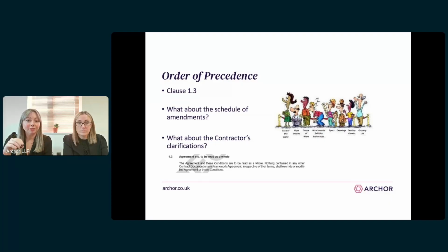So if you're a contractor and you want to rely on a set of clarifications or assumptions, whatever you want to call them, it's really important these are dealt with in the contract and that they're given the correct weighting so they don't rank behind another document which would override what the contractor assumed at tender stage.